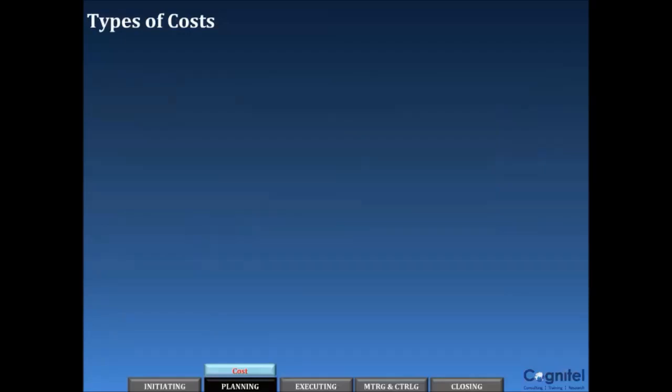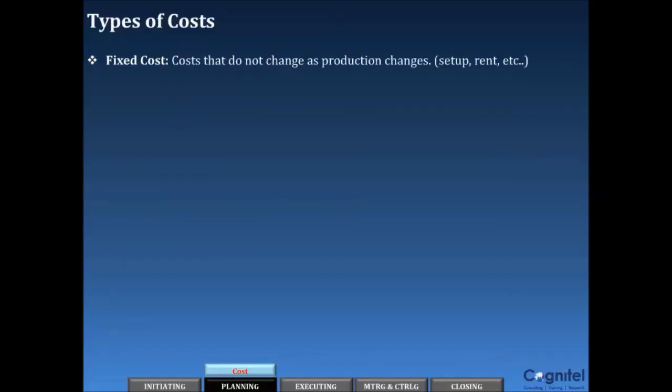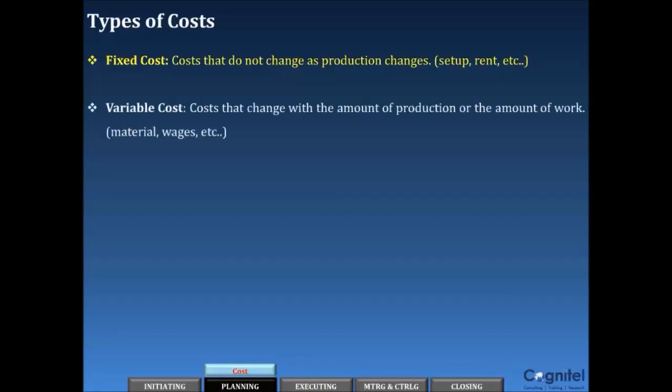As a project manager, you need to be aware of the type of costs that impact your project. Fixed costs are those that do not change throughout the life cycle of a project. For example, if you are constructing a road, the excavators and bulldozers are fixed costs. For software development projects, the physical development space and development computers are fixed costs to the project. Variable costs are costs that change during the project life cycle. Construction projects usually have a long duration and can easily span several years.